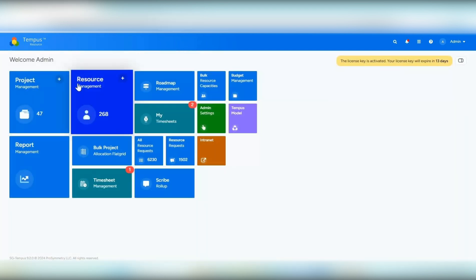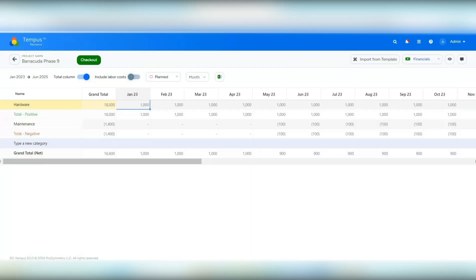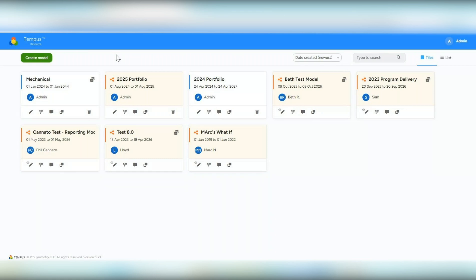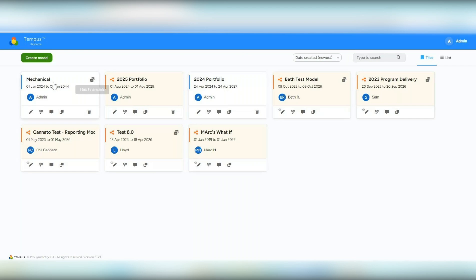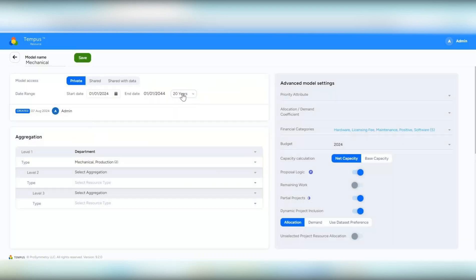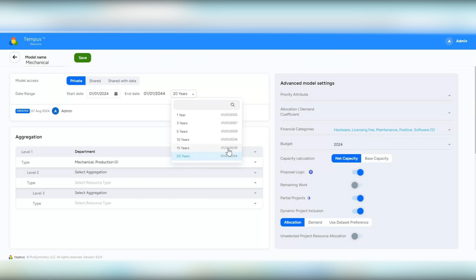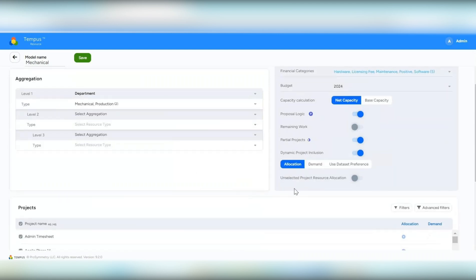The next area is what if. In the Tempest model screen, there's a new icon — hovering over it says has financials, which denotes whether financials is configured within the model. This is helpful when you may not know if financials is configured. We've also added 15 years and 20 years to the model timeframe — for example, 15 years would go out to 2039 based on the start date, and 20 years to 2044. We also removed the dependency option, and now all dependencies will be shown by default within the model.